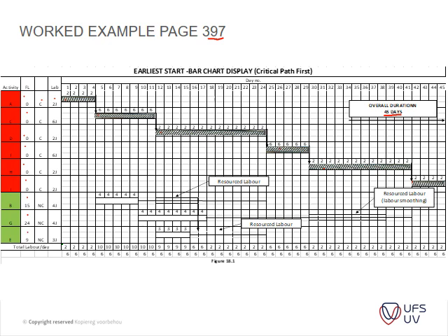For instance, here we need 2 laborers per day for item A. For item C, we need 6 laborers per day, and D 2, and so forth. Okay, so what you do is you list those laborers and you add the number of laborers that you need per day. Okay, so that's how you add it.